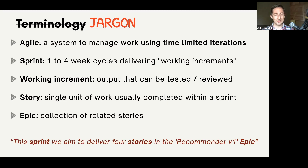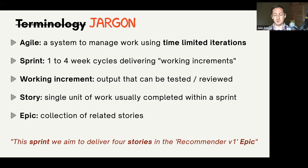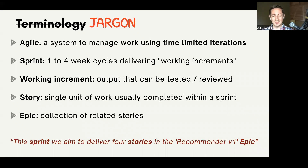What is this thing? Let's go through some terminology — there are a lot of buzzwords. Agile is just a system to manage your work using time-limited iterations called sprints — one, two, or four-week cycles. You're delivering working increments, meaning output that can be tested or reviewed. If you're building an ETL pipeline, by the end of that sprint, someone can review a partially working ETL pipeline. Or if it's an analysis, there's something reviewable and feedbackable. The whole idea is to get feedback from your stakeholders and managers sooner, because they might just flag something that puts a real spanner in the works.